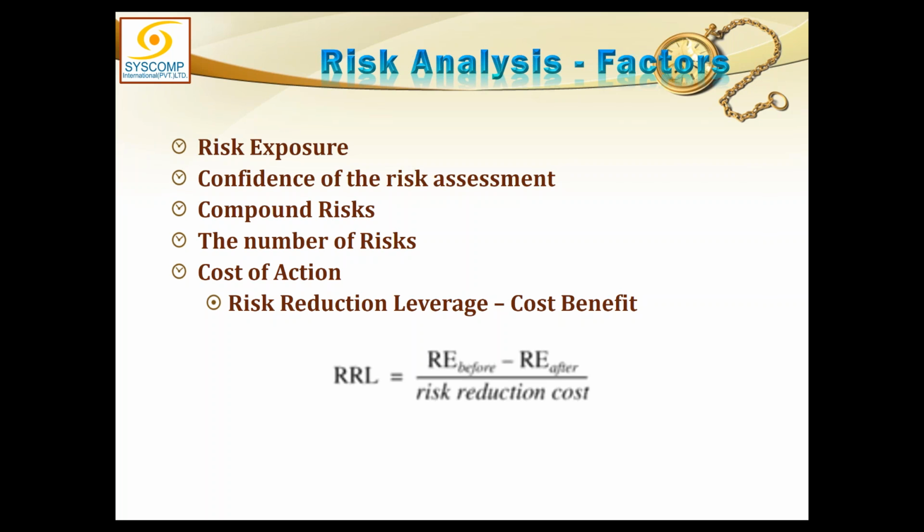But there are other features also, other functions which could happen, like somebody smoking in the room, somebody using a gas stove and things like that, and they have just 10%, 1% impact. But 90% of the impact is due to the wiring. So I decide to replace all the wiring with quality wiring, which will eradicate or reduce the probability of this room catching fire due to electric shortage, short circuit.